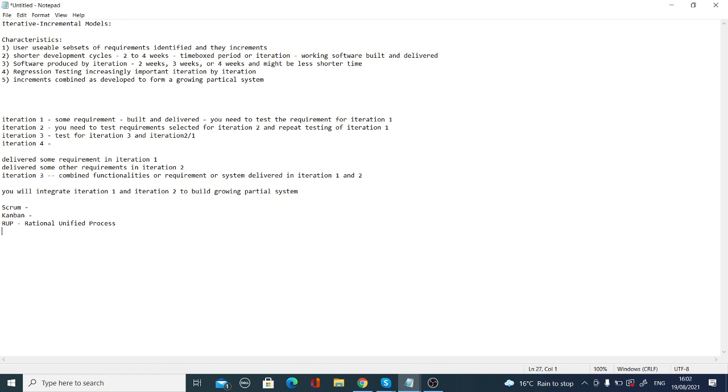When you are building software, you will not bother about anything else. You are concentrating on the processes. In this one, the iterations are longer. It can be in months, 2 months or 3 months, because you pick up one end-to-end process, work on it and deliver that particular process.